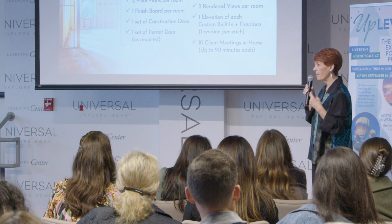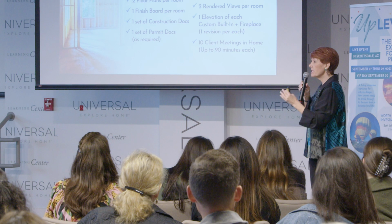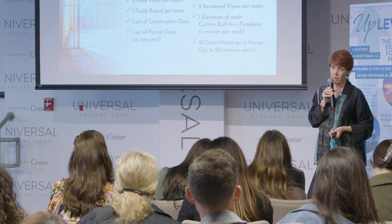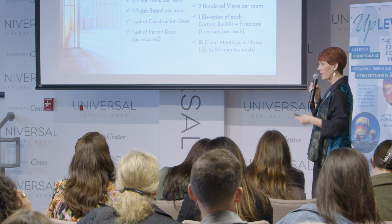They put all floor plans. I'm like, no, please don't do that. Because it's two floor plans per room. You could say three, or five floor plans per room, but that's your choice. If you just say all, the client says, you know, Melissa, I think we'd like three more floor plans for this room. Melissa, I think we'd like another floor plan for this room over here. And you've already done two for each room. So if they want more and you've spelled it out, then additional fees and a change order. Okay? You're paid for it. But if you put the word all up there, you're on the hook. Don't do it.